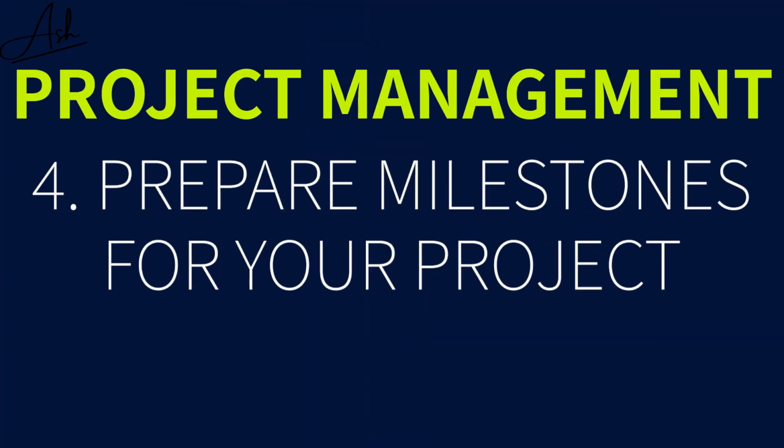The fourth part is to prepare milestones. What are the various achievements you're going to achieve along the way? A timeline. If you have 1 year, what is the end of first month result that you expect? Similarly, break it down into every month and track that milestone. Have regular drumbeat meetings to review if it's happening as per the milestone. Take feedback, fix things as it goes. Don't wait till the end. And as long as your milestones are achieving the results intended, you are on the right track.